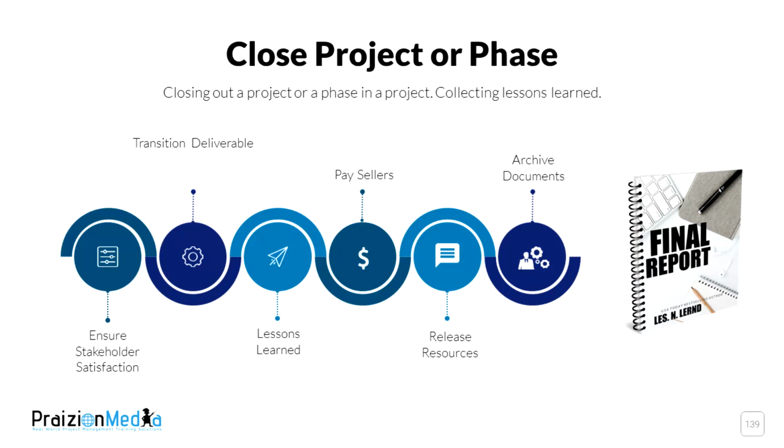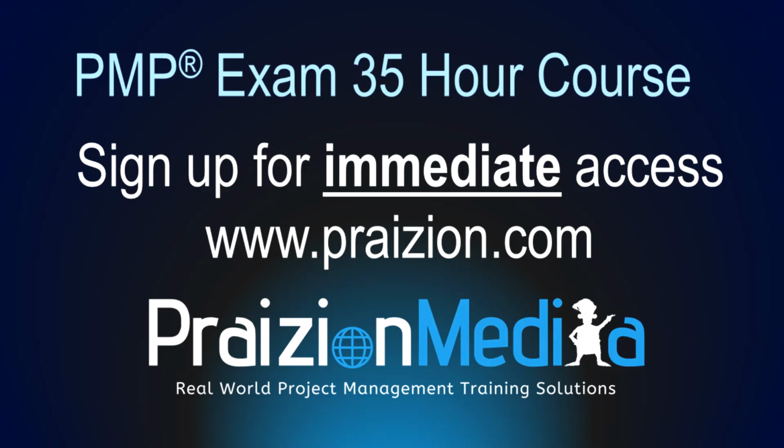in the firm. This is where you are also involved in the final archiving of any project information that can be used again. This is where you are also involved in closing out all of those cost accounts. You're also involved in managing any resources that were surplus, making sure that excess resources are handled the right way. You're also involved in taking account for why the project got shut down prematurely in some instances. So you're carrying out the analysis. You're also carrying out work to produce a final project report. So this is a loaded process. Lots of things happening here, closing out documents, finalizing reports, so on and so forth. Okay? And that concludes the 49 processes of the PMBOK Guide 6th edition.